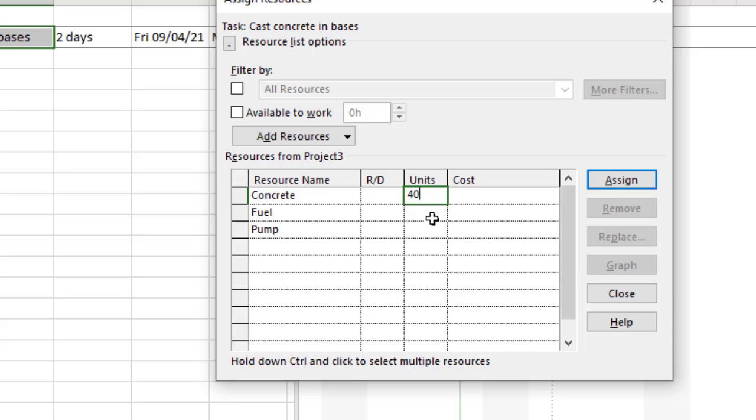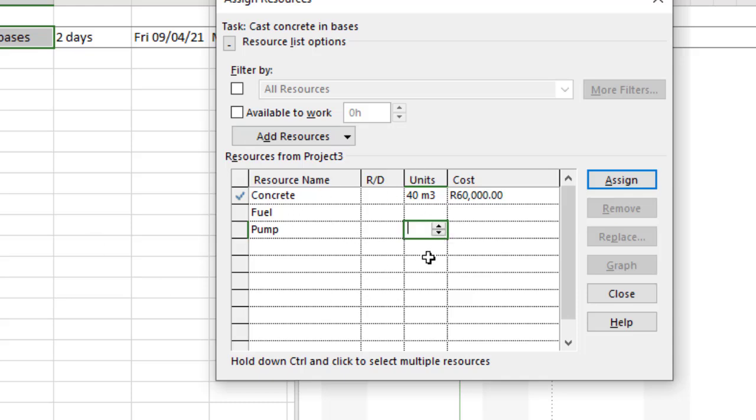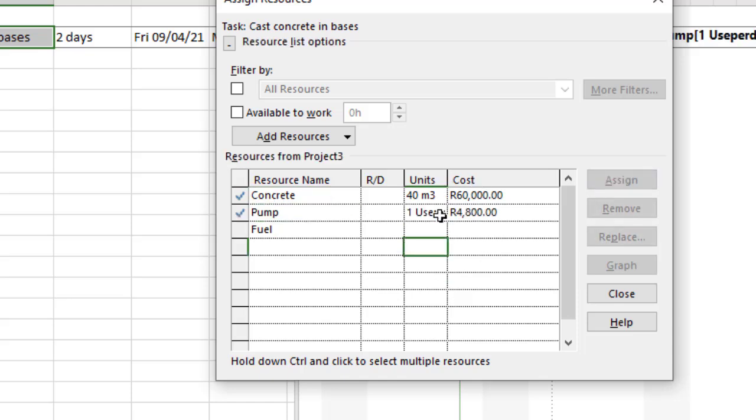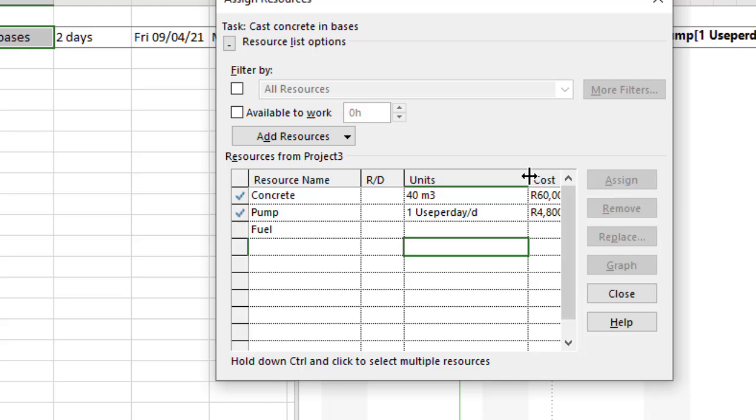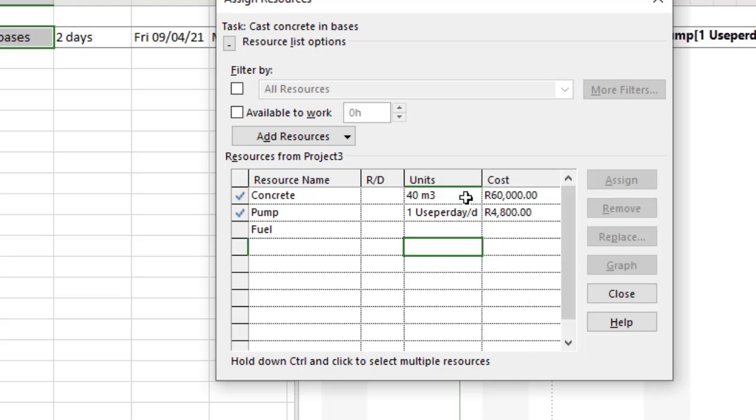Let's do the pump first. Instead of just having one unit or two units, I'm going to say one and then use the forward slash to indicate 'per', and I'm going to add in a D which means one per day.